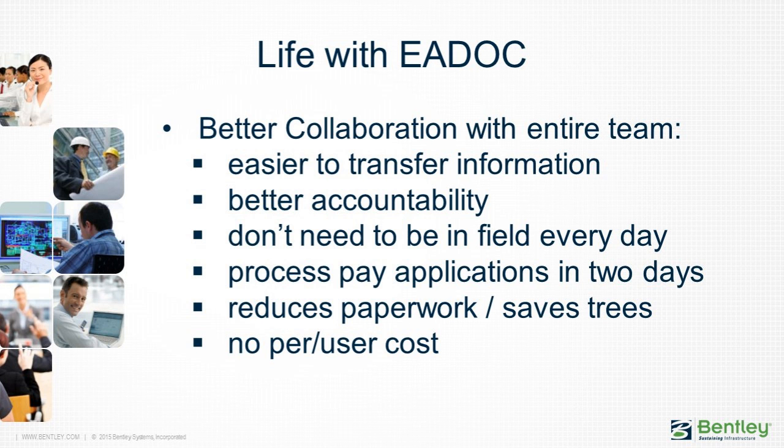Pay application. If everybody is on the right track and everybody's cooperating, a pay application can be reviewed and approved in less than an hour. But I give them a couple days to review it. There's no more 30, 60 days. There's no more you hand deliver it to the architect, the architect hand delivers it to the owner, and the owner hand delivers it back to the finance department. Everything is done electronically and can instantly be approved or denied.